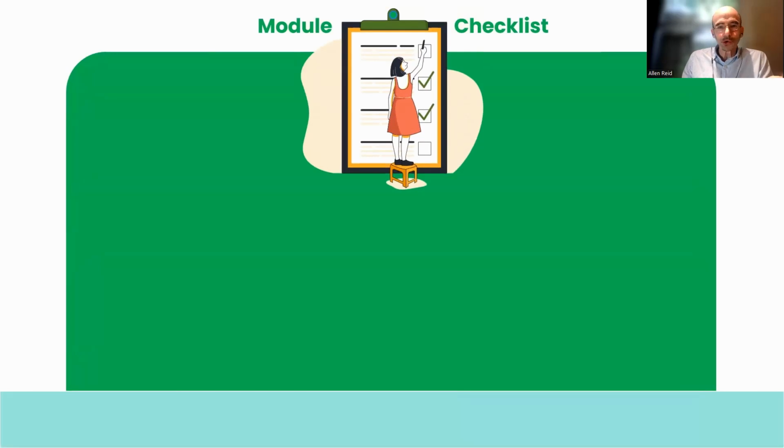Just again, your checklist of things that you should be looking at in order to make sure this process goes well. So schedule for your voting groups and your feedback groups to be created. That means you're saying to your voting groups, we've got 4 suppliers, 3 meetings with each supplier. That's 12 meetings plus internal meetings to break out the ITTs and so on. Is that all booked? Are you able to commit to that?